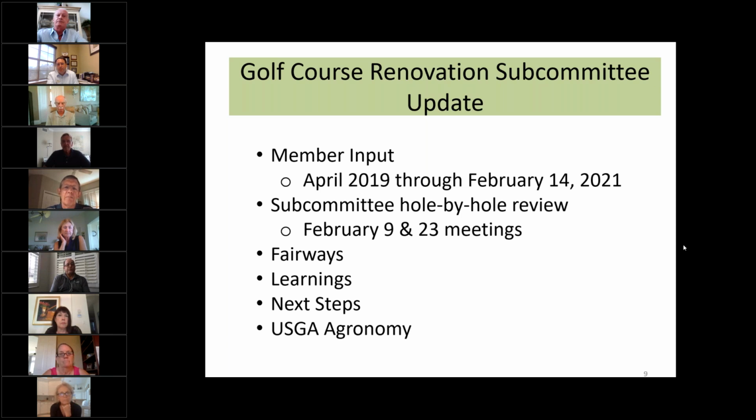Yes. Kip told us at one meeting, if I recall, Tom, that when he puts it out for bid with the construction companies, he's going to ask them for alternate bids. What's it going to cost for the wood bulkheads versus the stacked rock? And then we'll have the information to make the decision. It's more than a cost factor, but we'll have a cost number.